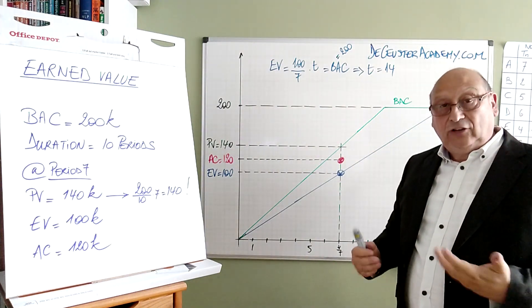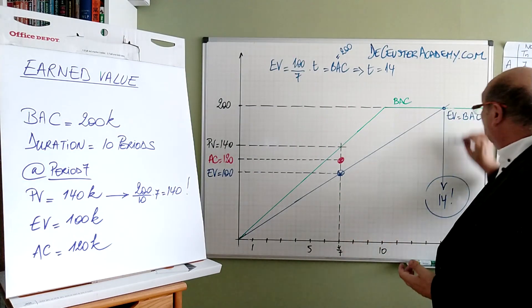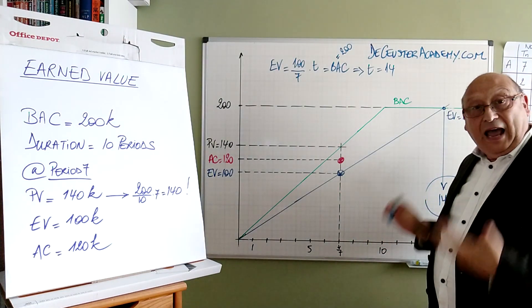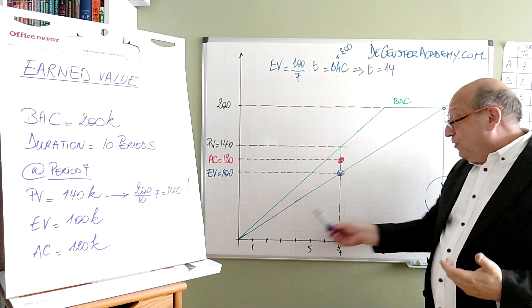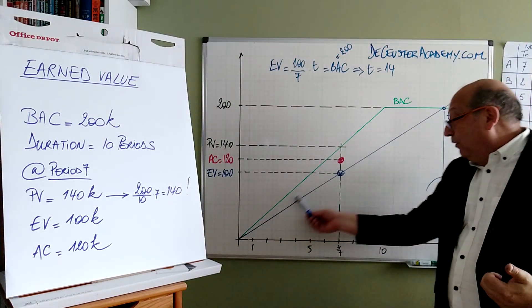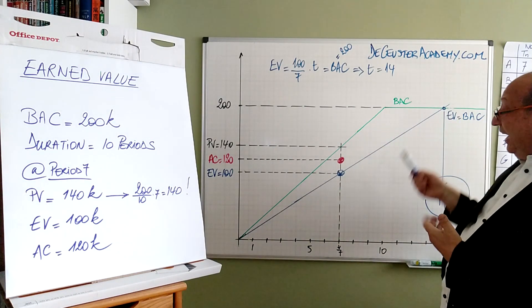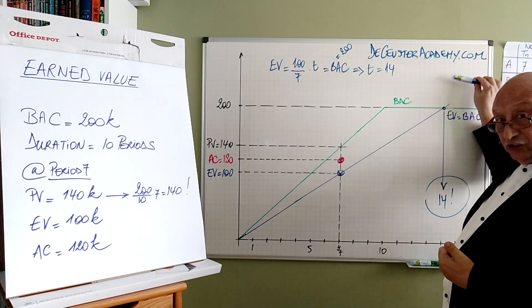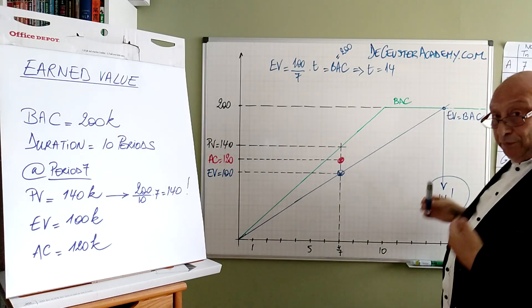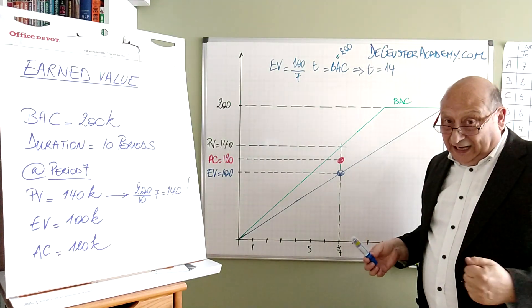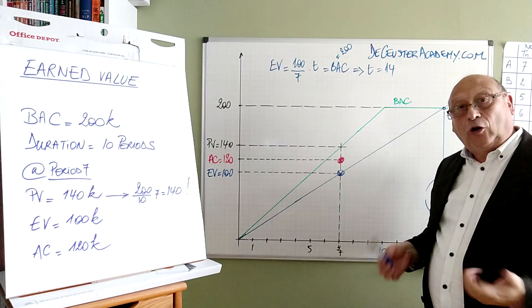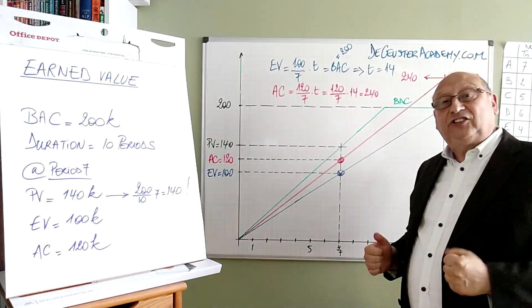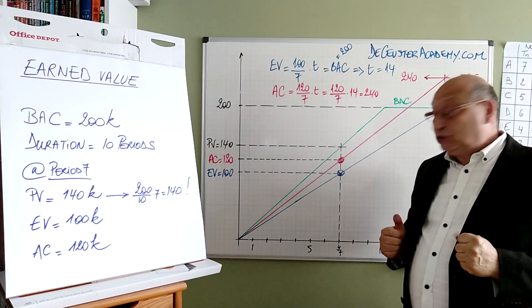So it's just a linear interpolation and we find the end time of the project. The next step is to do the same. We will interpolate or extrapolate this value until we reach the end of the project, and doing that we can find the estimate at completion.